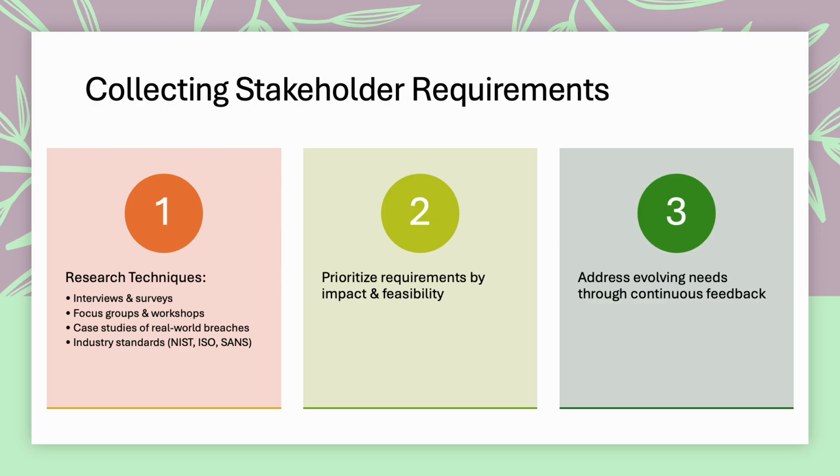Analyzing real-world case studies of cyber breaches is another powerful tool. Many organizations learn the importance of cybersecurity training only after experiencing a costly incident. Reviewing publicized breaches, such as phishing-related attacks on large corporations, can highlight gaps that the training program must address. For example, if a breach occurred because employees failed to recognize a spear phishing attempt, the requirement might be to include advanced phishing awareness scenarios. Using external case studies adds credibility to requirements and ensures that the training is grounded in real risks.